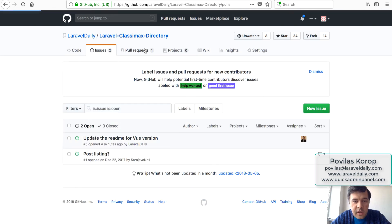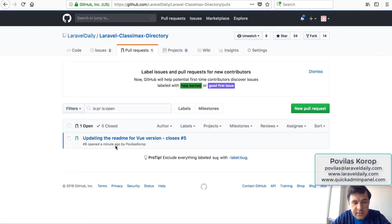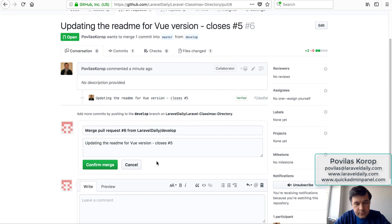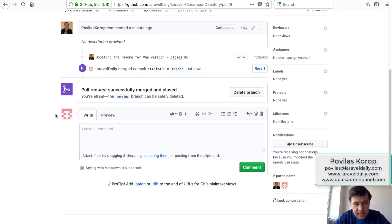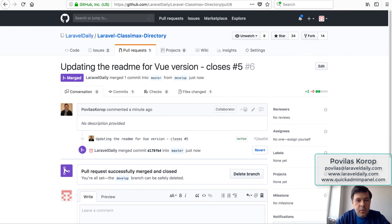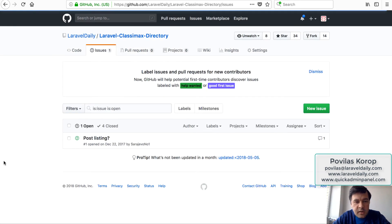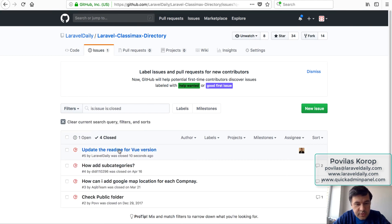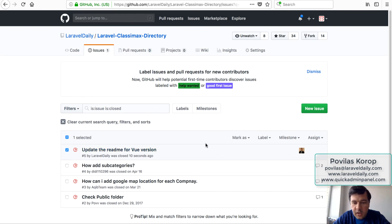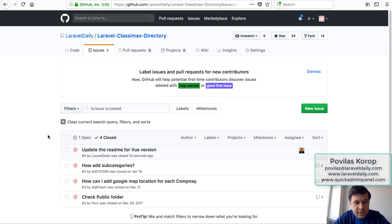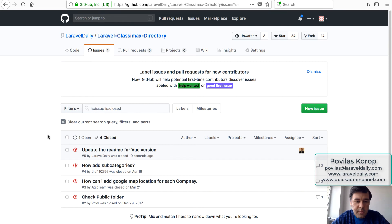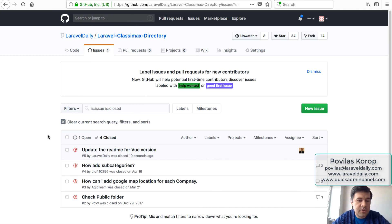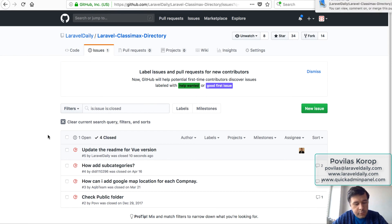Here I have pull request which I will merge. Merge pull request, I can confirm that, and the merge is done. And the magic what is happening now is there will be only one open issue. The issue that I've actually closed, it's automatically closed. So I didn't do any mark as closed or any button that actually closes the issue. The main point here is that developer, while doing the commit message, he just writes closes issue number 5 or whatever. And then the CTO or whoever is responsible for that project merges the pull request, and then that issue is closed automatically. So this is the way how we're doing it internally.